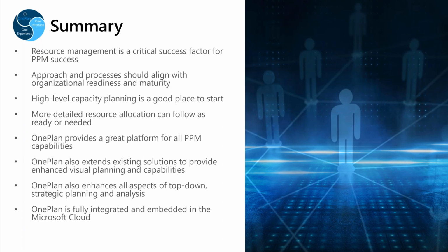There's different ways of going about it, but starting with understanding capacity and resource types is usually the first step, and then you can move into named resource planning. If you have resource loaded schedules, then it can be easier because that demand is being defined as you're actually building your project plan.